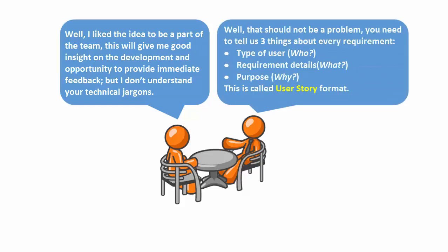You need to tell us 3 things about every requirement. First, the type of user, that is who is the intended end user. Second, the requirement detail, that is what exactly are you looking for. Third, purpose, that is why is it needed. This is called user story format.